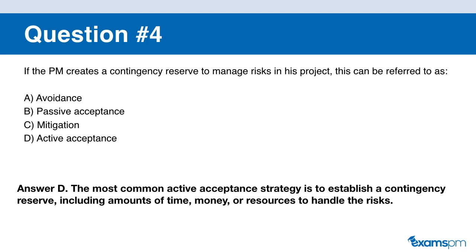If you said D, you are correct. The key here is that the PM is not doing anything to actively manage the risk — he's just putting aside a contingency reserve to deal with it if it happens. The most common active acceptance strategy is to establish a contingency reserve including time, money, and resources to handle the risk when it occurs. This is called active acceptance.